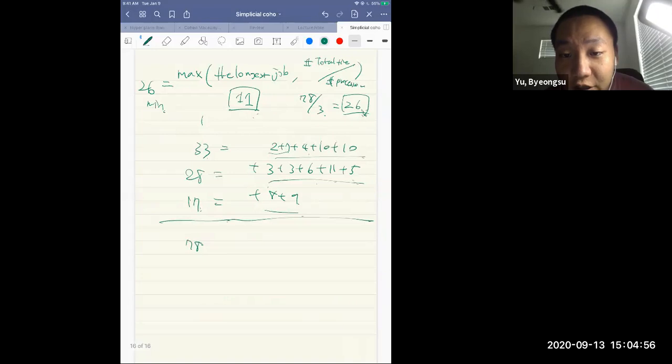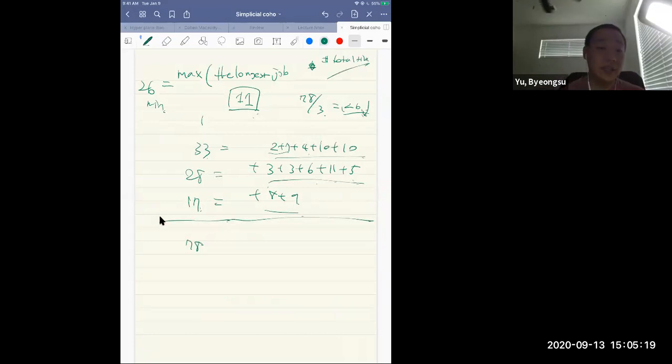Is the bottom of the equation the number of processors, not which process is the longest? Yeah, it is the number of processors, not the longest one. In this case, it is 3 because we have 3 processors. So this schedule is not optimal. And how long is an optimal schedule for this 12 task? It is 26 minutes, because 26 minutes is from the calculation.